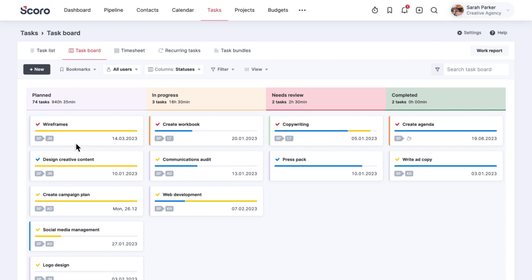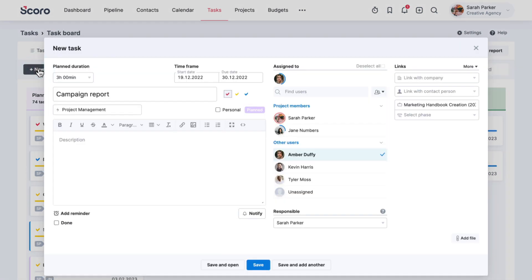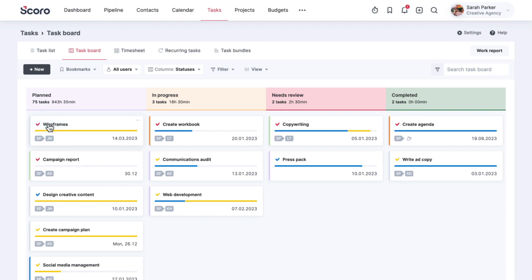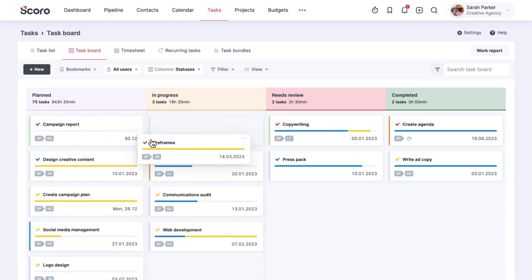You can easily add all new tasks to the planned column and organize them by priority. Whenever someone has availability, they can move the highest priority items to the progress column and start working on it.